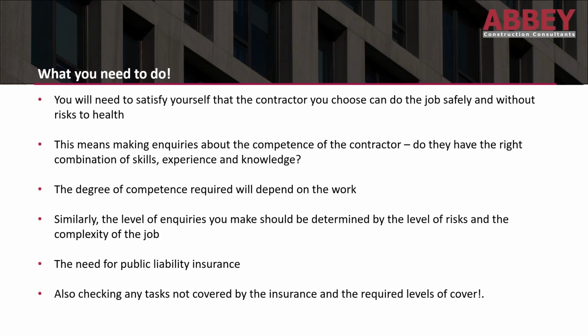Similarly, the level of inquiries you make should be determined by the level of risks and the complexity of the job. So the higher the risk, the more in-depth inquiries you would make regarding the competence of that contractor.